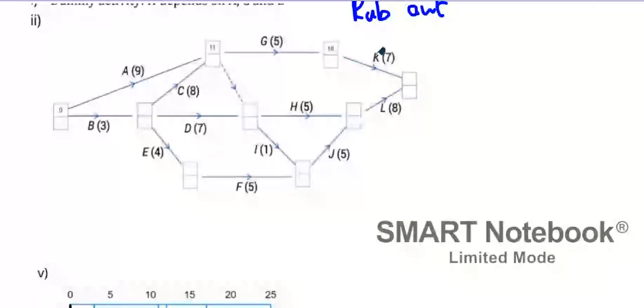And then 11 plus 5, 16. Okay. Here we see those numbers all right? I'll make it a bit larger in a second. Now, this has to be a 3 because it's the only way to get there. And then 3 plus 4 is 7. It's the only way to get there. Now, 3 plus 7 is 10. 10 is here, but it also could be an 11. So which one is it, 10 or 11?